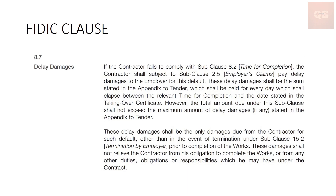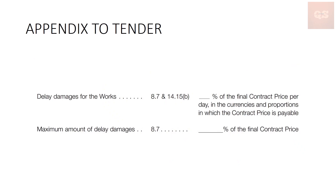Even if the contractor is delaying, it is still his obligation to complete the work. He cannot stop the work or forego his duties. Now, this is how an appendix to tender looks — you have to fill in the delay damages for the works and the maximum amount of delay damages. Subclause 8.7 covers delay damages, and clause 14.15(b) specifies which currency is used for the contract. If in UAE it will be dirhams; if in India it will be rupees. You fill in the percentage of the final contract price per day as the damage, and also the maximum amount — typically 10% as the maximum limit of delay damages.